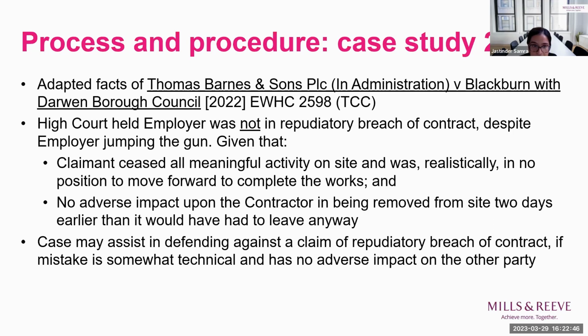And the High Court gave two main reasons for this. The first point it made to support its decision was that the claimant had, in that case, ceased all meaningful activity on site and was therefore realistically not in any position to move forward with the works. As a result, there was no adverse impact upon the contractor in being removed from the site 2 days earlier than it would have had to leave anyway. Two days being the date on which the second termination notice would have been valid under the contract.